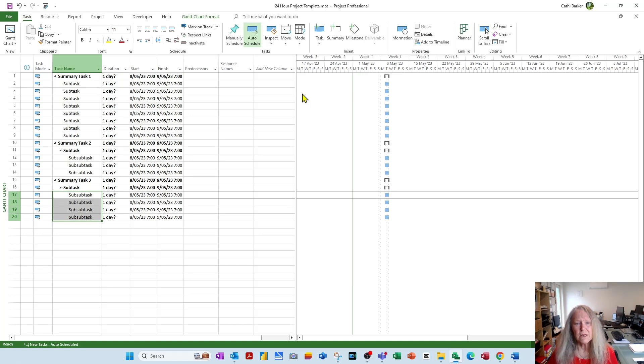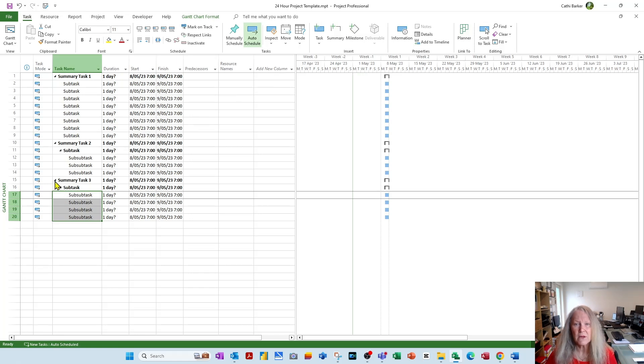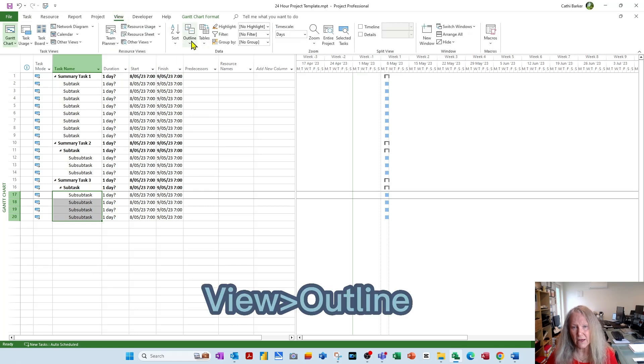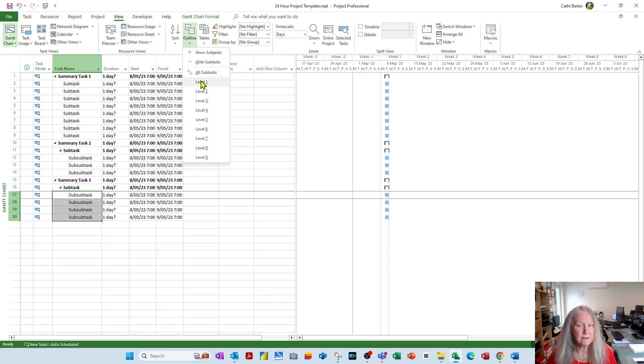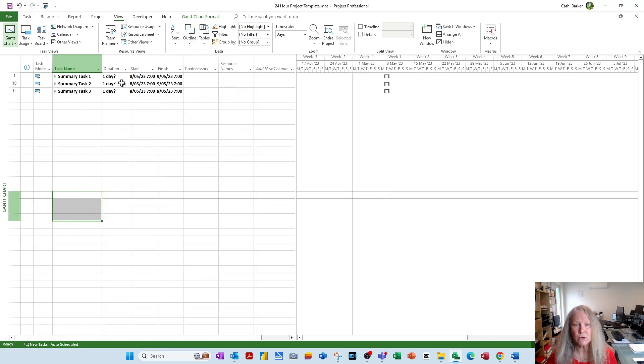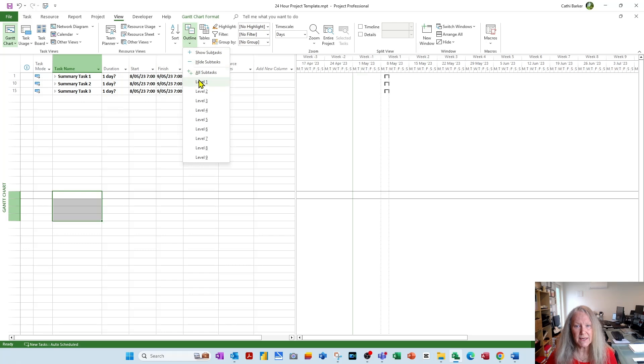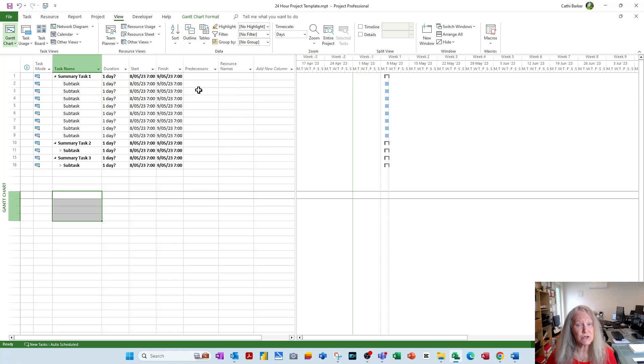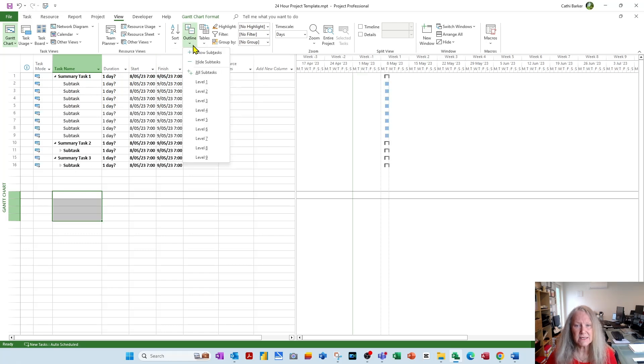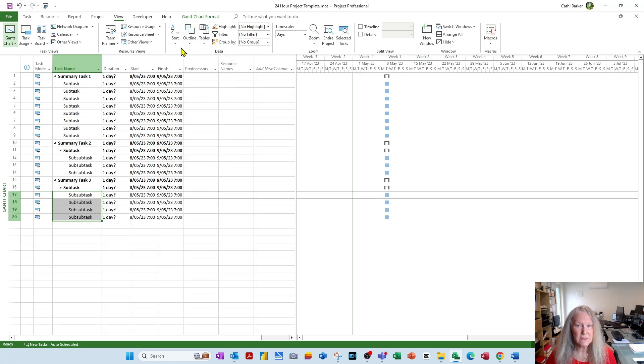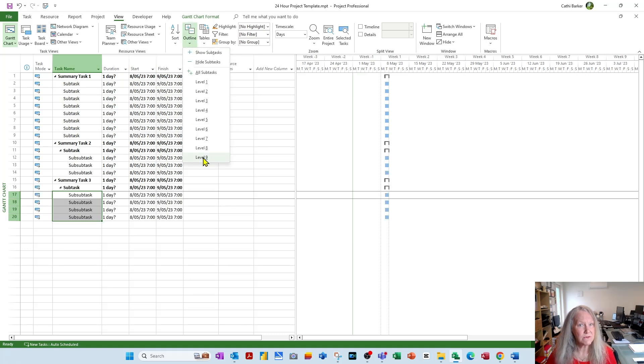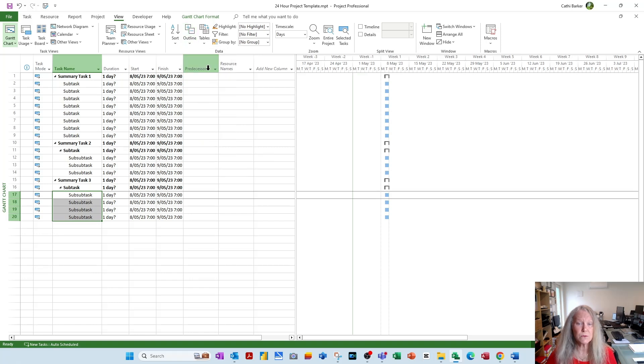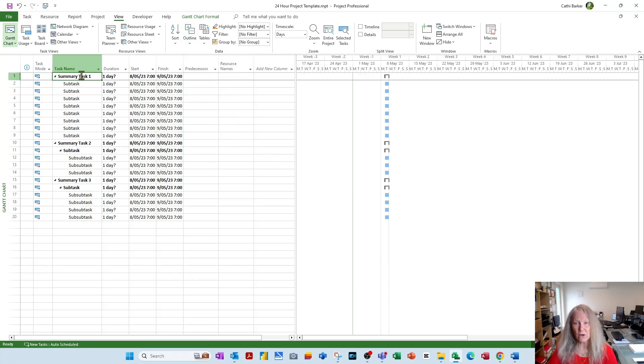Now, we are now able to collapse and expand using the little black triangle. But another way is to go to view in the ribbon, and go to outline, and ask to see level 1. If you ask to see level 1, you only see your top summary tasks. If I go back to outline and ask to see level 2, I get the next level. And if I ask to see level 3, I get all the details. But notice you can have up to 9 levels of indenting, and all subtasks will always bring everything back. So create your outline structure.